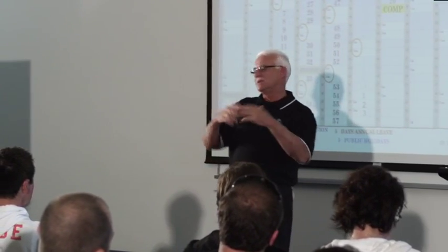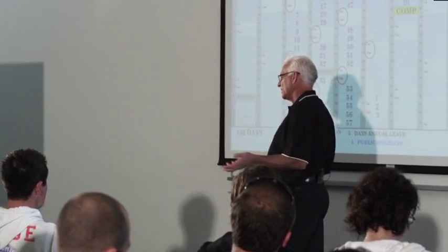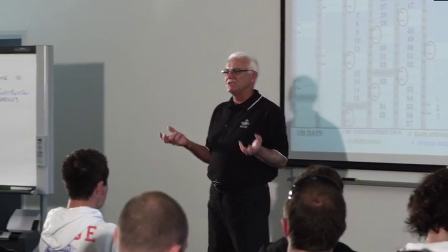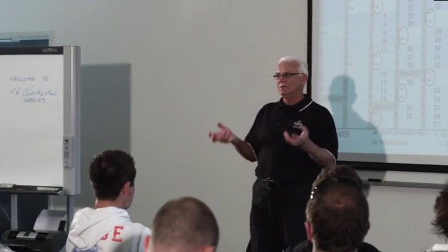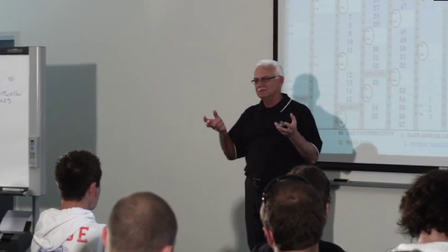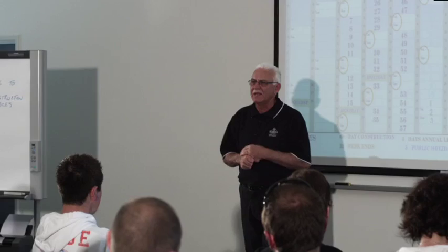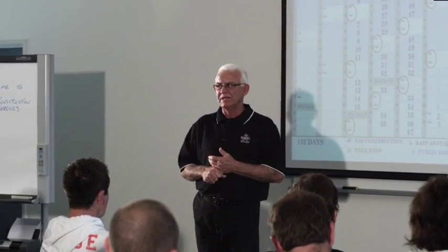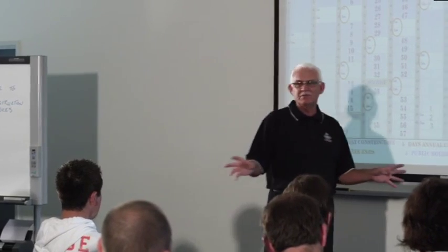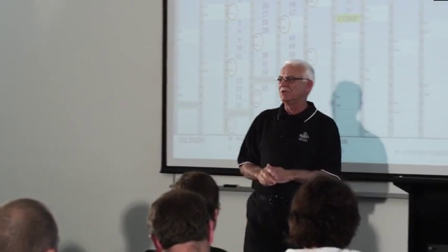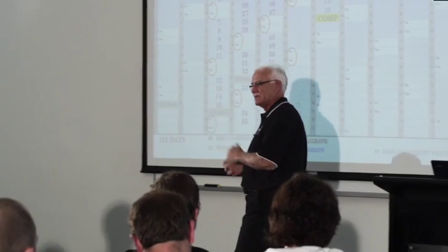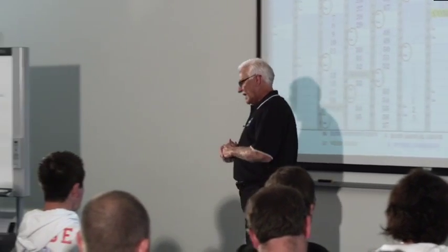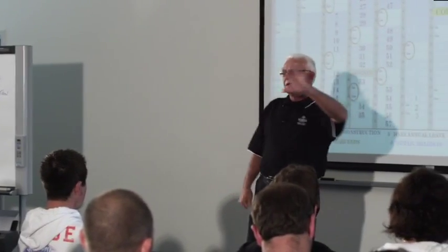Again, so much litigation going on at the moment, so many problems. Legislation has been changed so that the law now says that if there's nothing stated, liquidated damages will be $50 a day. Okay? So if you don't put anything in your liquidated damages clause and you end up in the tribunal, the judge is going to order $50 a day. Okay, so they've sorted that one out.